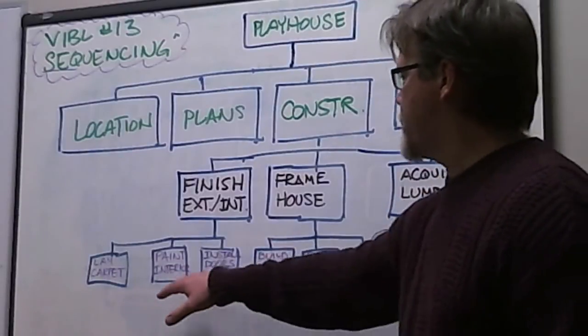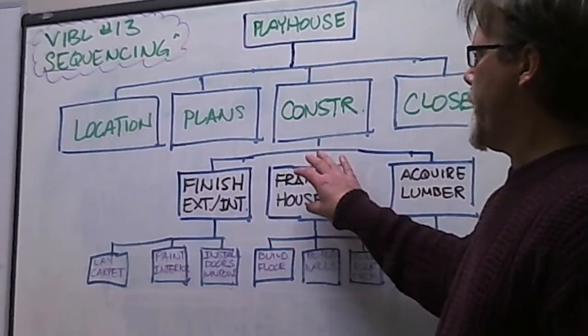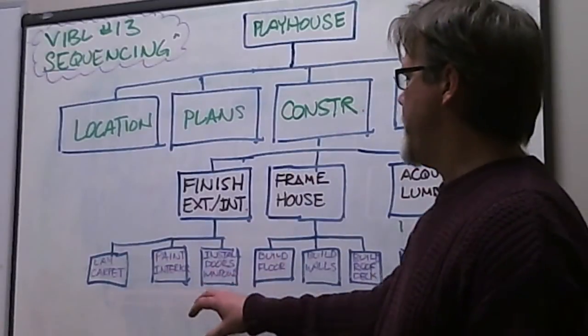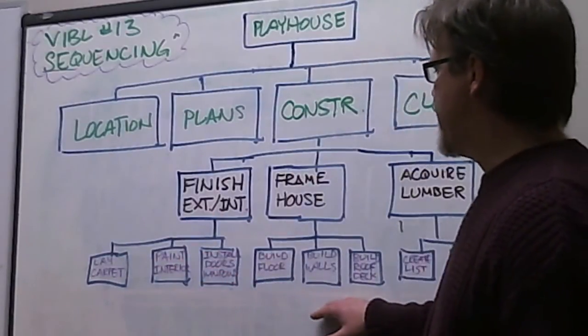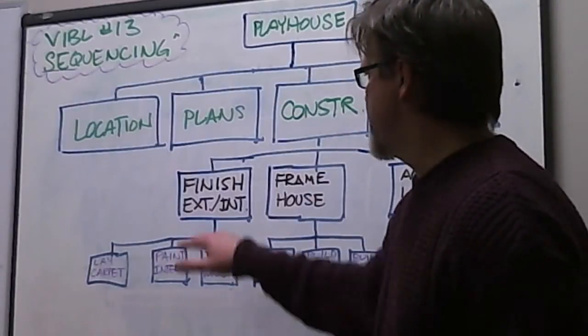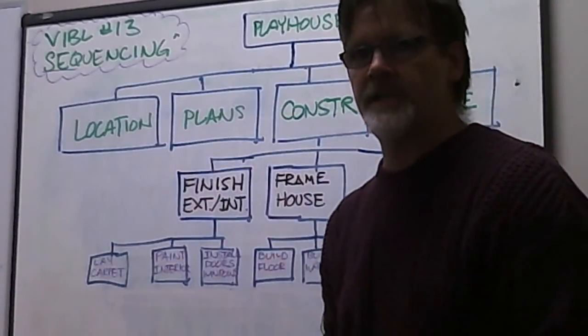Thing to remember is that each of these activities support that work package. So when you break them down, make sure that the sequence of your activities is consistent with the sequence of the work packages as you've identified them.